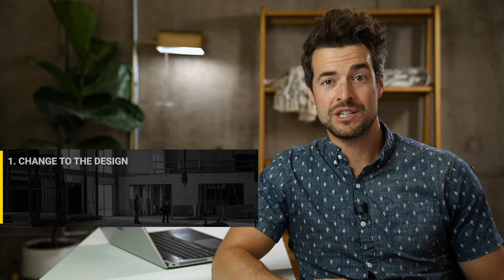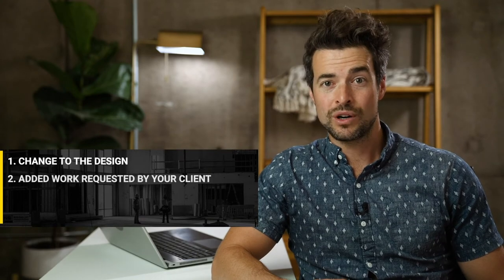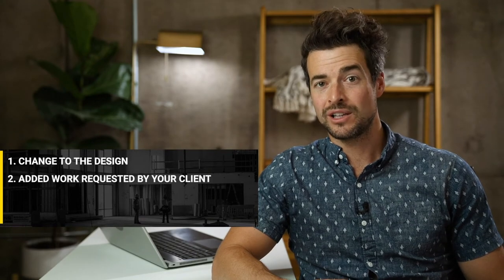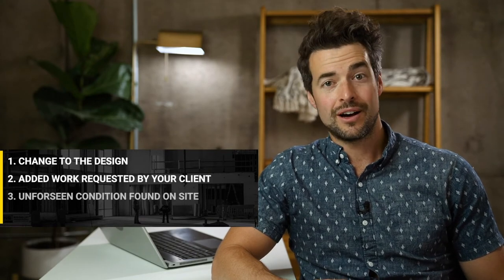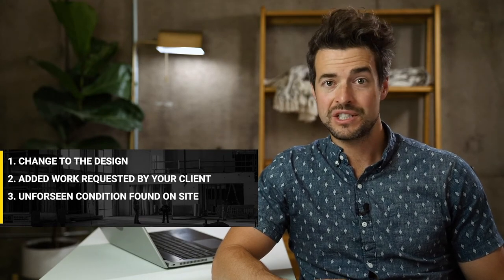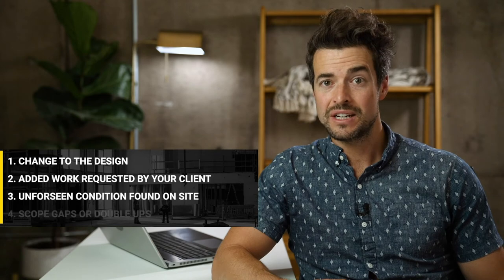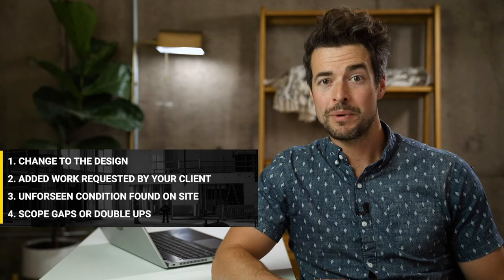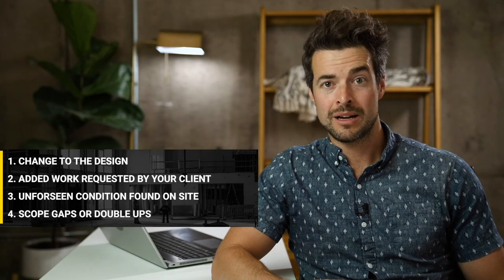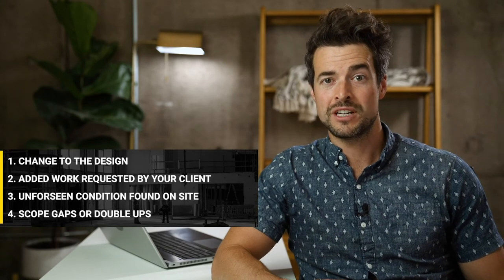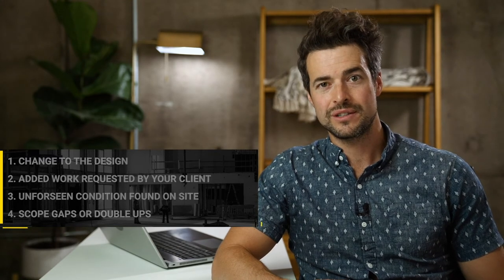A potential change order is any issue on your project which may result in a change order. This could be caused by a change in the design, added work requested by your client, unforeseen conditions found on site, or even scope gaps or double ups within your own subcontractors.